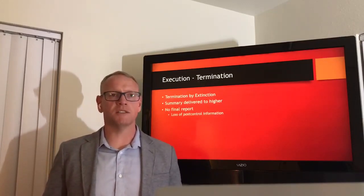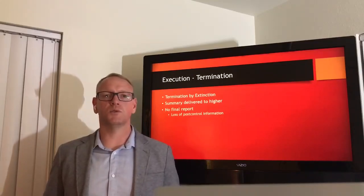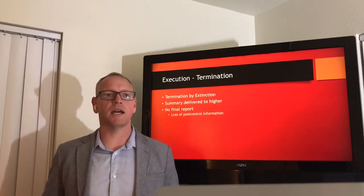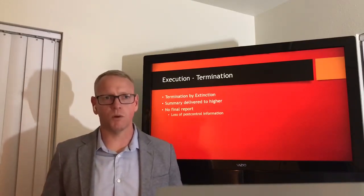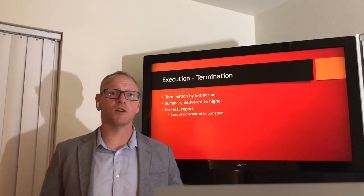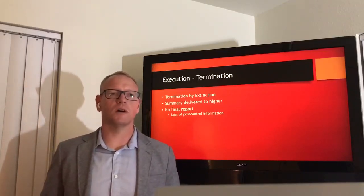So for the project termination, it was termination by extinction, whereas the project was complete, and so everything was wrapped up and completed. We did deliver a summary to our higher as to what was successfully accomplished throughout the project. However, we didn't actually perform a final report, and that final report is something that's common in the Marine Corps to do. It's called an after-action report, where all those lessons learned, the things that we identified that could have been done better and what went well for us, would go into a report and get reported to higher, or at least saved within the local section.